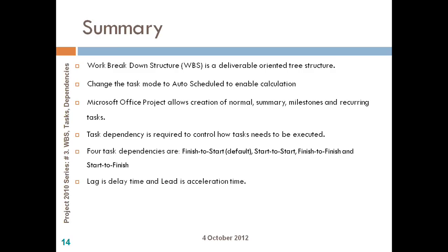If you want to have a lag time or an acceleration time between any two linked activities, make use of the lag field at the predecessors tab to set those dependencies. And finally, we talked about constraints when you have some external dependencies or deliverables which cannot start as soon as possible.